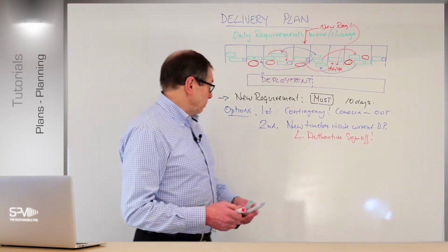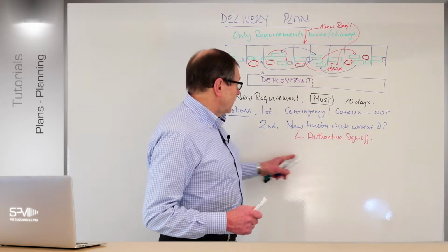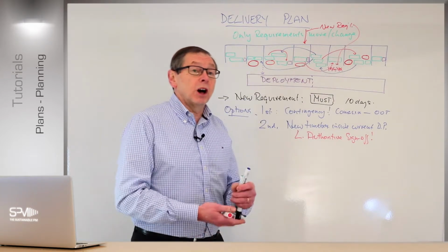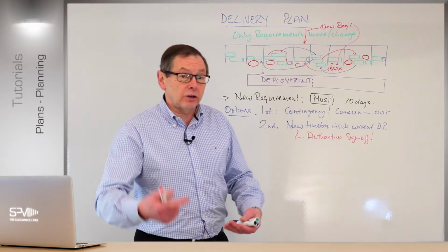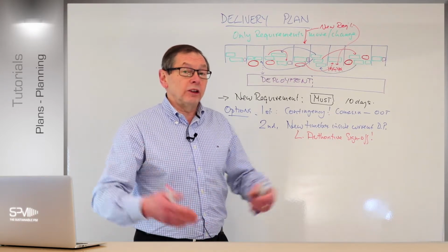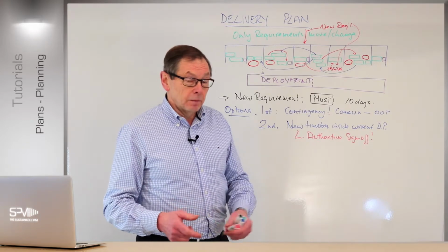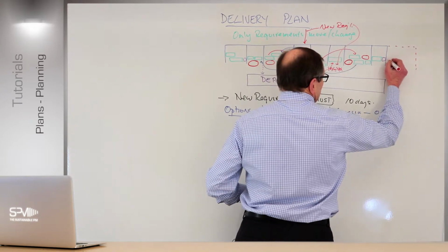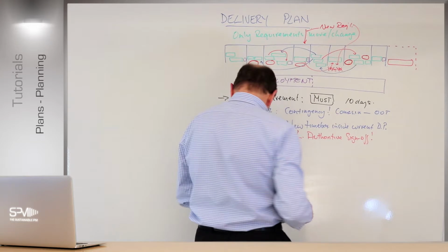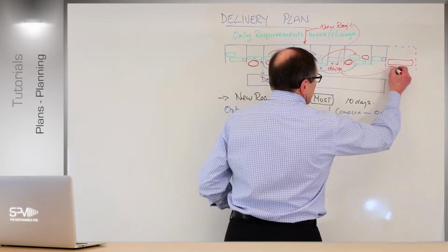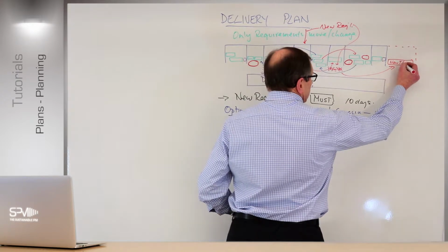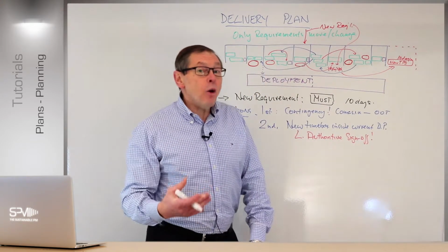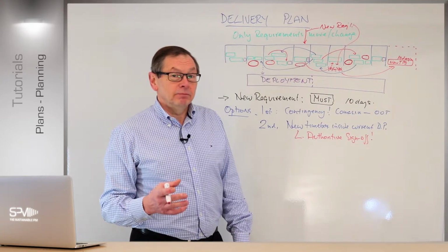Not a problem. Now, it might be that you turn around and say, well, actually, that isn't going to work too well to put the change in that particular time box within the current delivery plan, because we can't get the resources, we don't have time to get that part of the requirements built in detail, or at least understanding an overall view of that, right? So the next option, the third option, might be to extend the project, now it's not to scale really, and put that in here instead. So now we've got the new time box here for my 10 days, right? Yes, now we're impacting on the delivery time frame, okay?